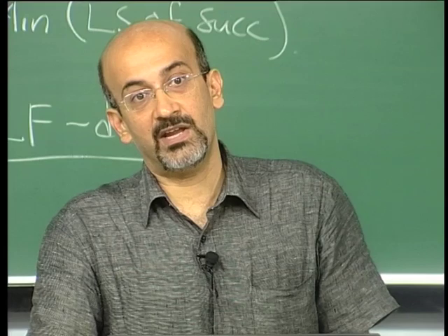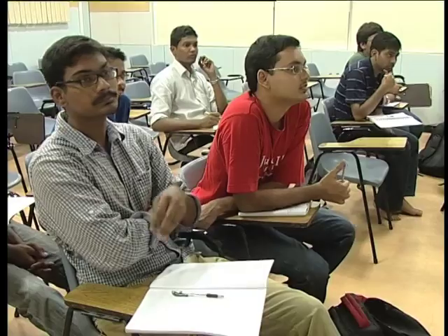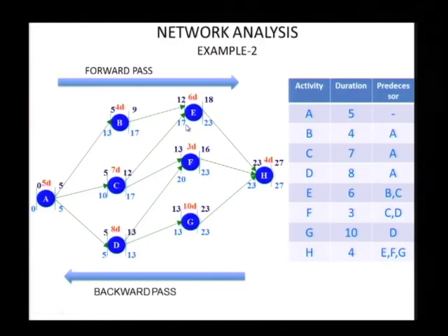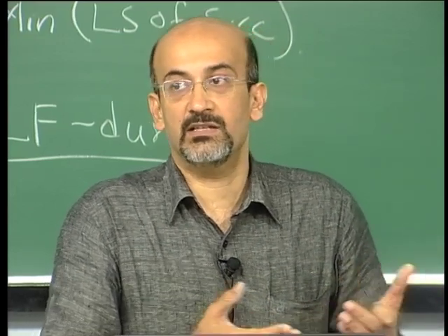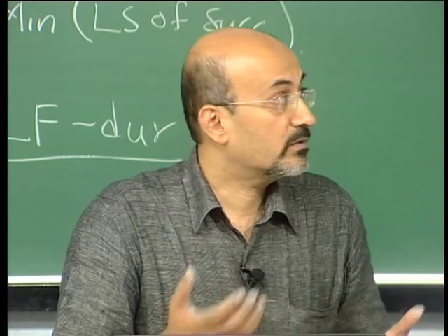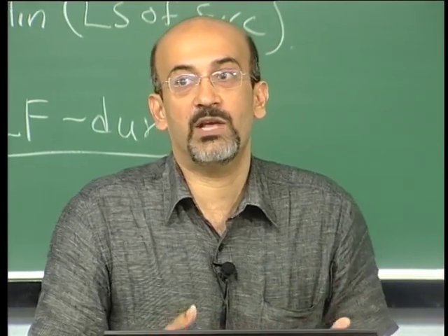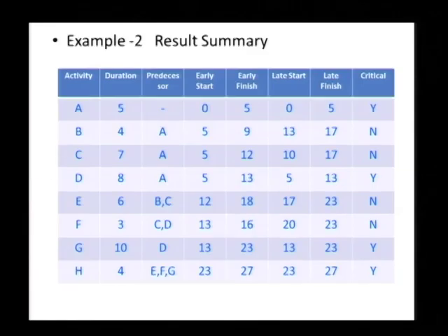If I go to the 4th day, E will start getting impacted, unless I of course move E all the way to start at 17. So there is a lot of play here which project managers use to schedule resources, if they have to share resources between activities. This is all about slack or float, and this is something one has to understand very well to be able to utilize resources effectively on a project.